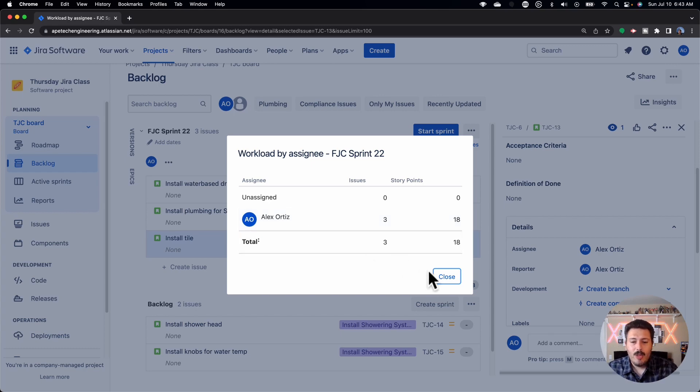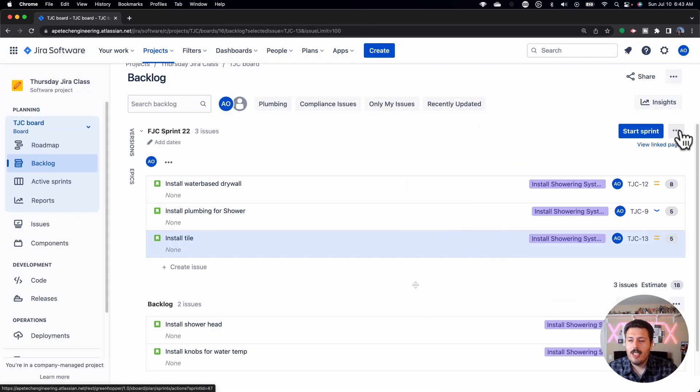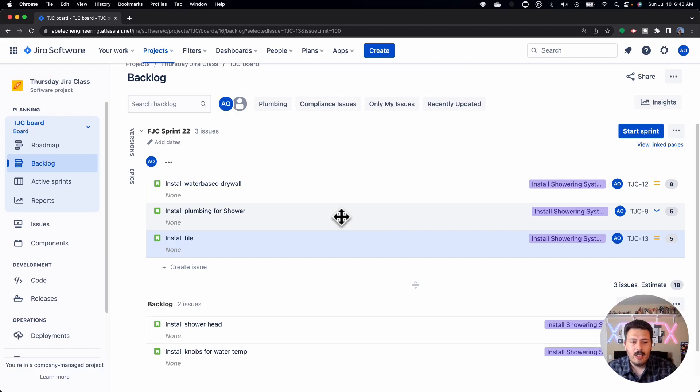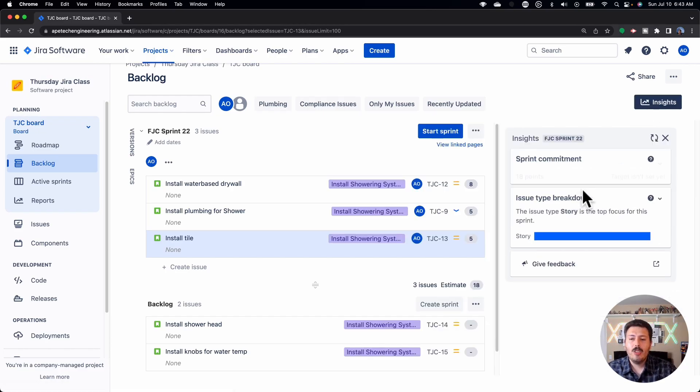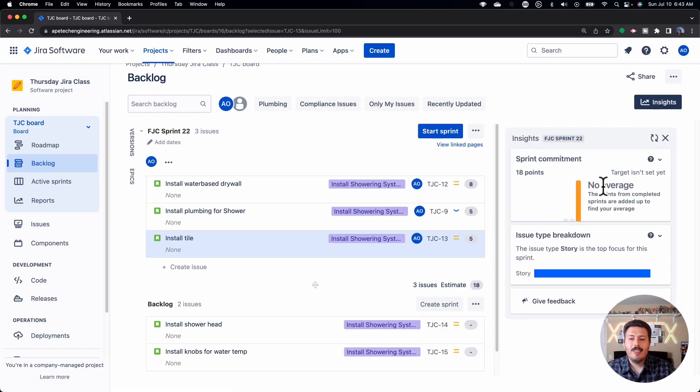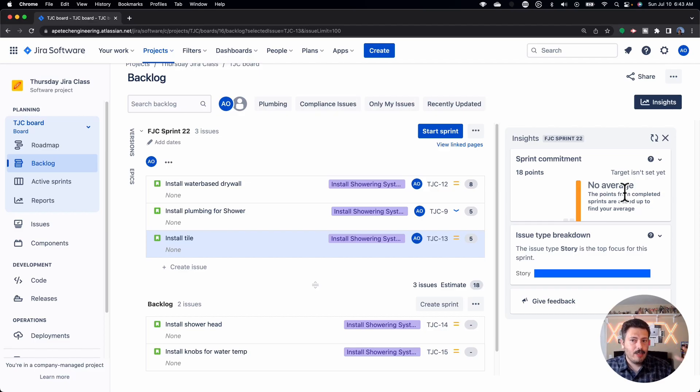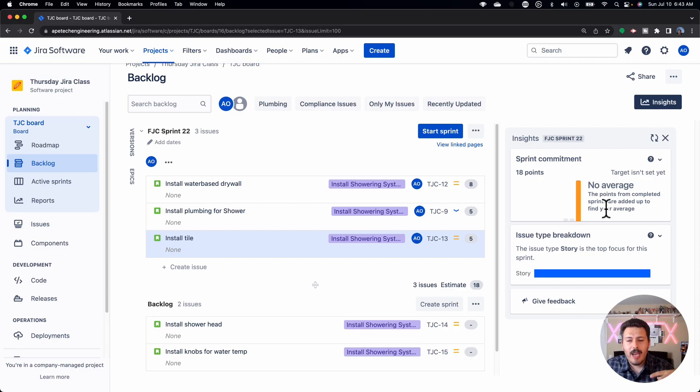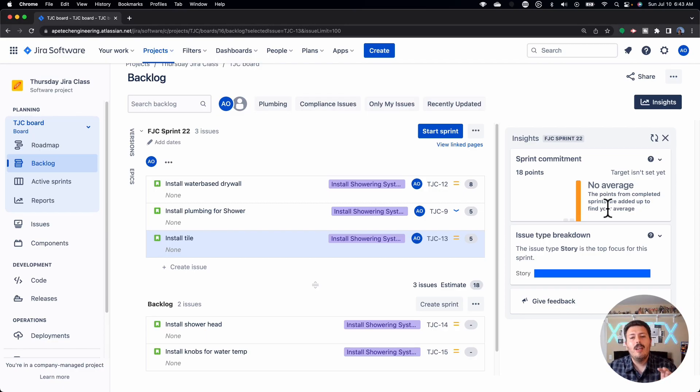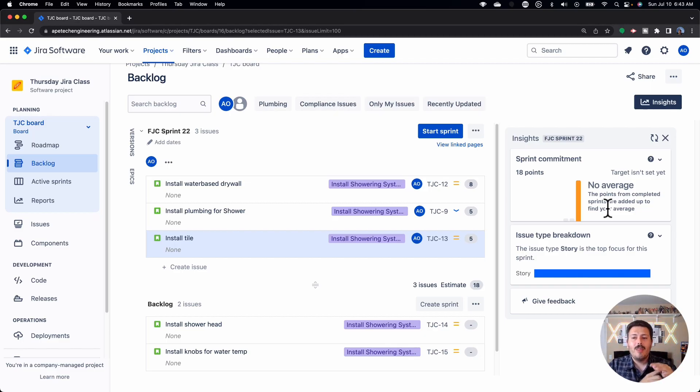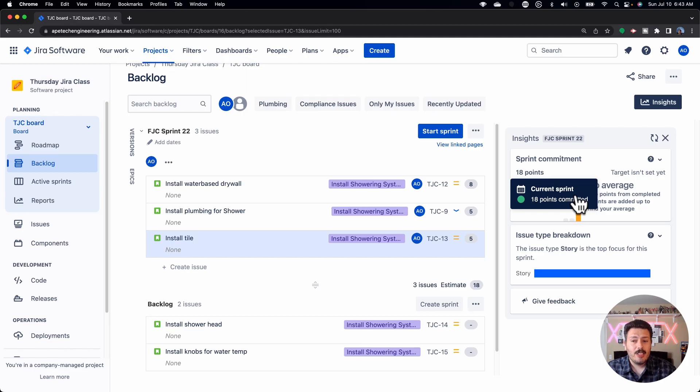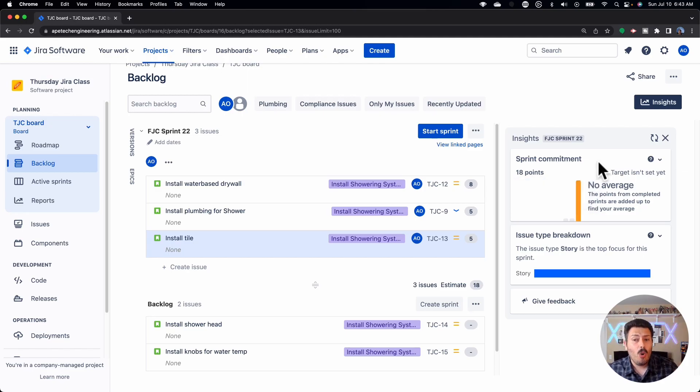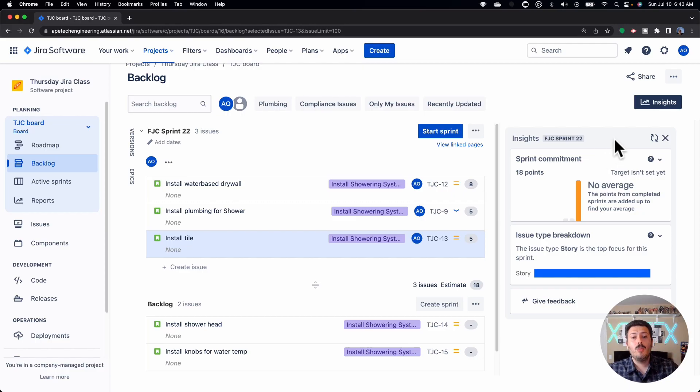If you need a little extra help, a little extra nudge, and maybe a little bit more guidance, Atlassian has just created this new feature here for Jira called Insights. And if you click on that, it is going to essentially, based on historical data, based on historical performance of your team, tell you in a very Goldilocks manner where you are with respect to your story points. So it'll tell you, based on your team's capacity and velocity from previous sprints, are you just right, are you under, or are you overcommitted? And so this is a great measure to maybe understand if you've assigned your team enough work, or if you still have some wiggle room, or if you've assigned them too much work and it's time to get rid of it.